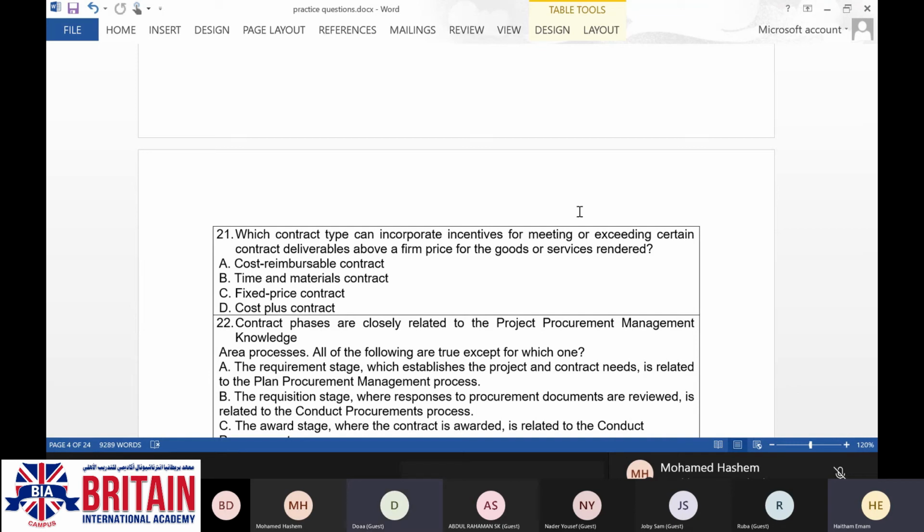First one is called firm fixed price, and in that one you have a lump sum amount or lump sum value for your contract, and you have agreed with your vendor on that price. So whatever will happen inside this project, you are not going to exceed it by 1 cent. Okay, that is our first subcategory.